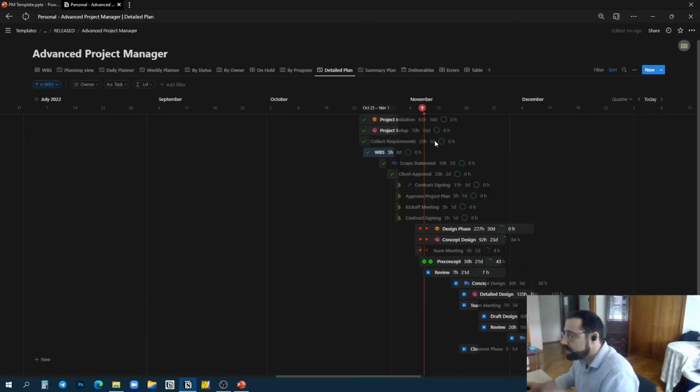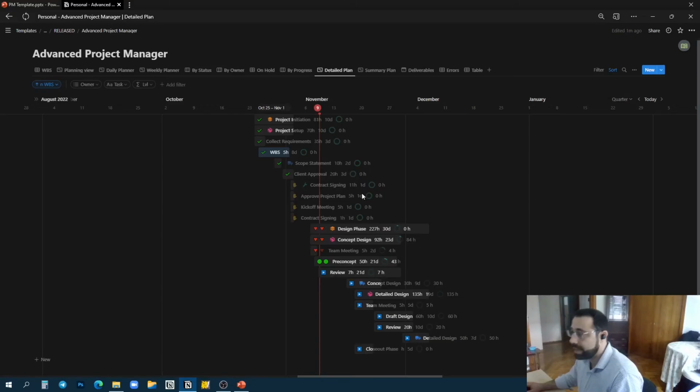And not only that, you will notice that all sorts of stats will carry out. As I said, 81 hours, because you have here all the subtasks: 1 hour, 5, 5, 11, 3, 10, 5, and 35. If you sum all these, it will give you 81. 70 of these are in the project setup, which is these guys over here. And not only that, the total duration also depends on it, and also how much work has been done. The progress here is 100% because all these tasks are completed. So thus, the parent is complete.